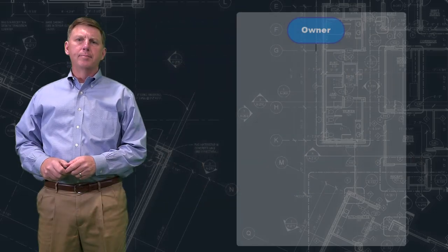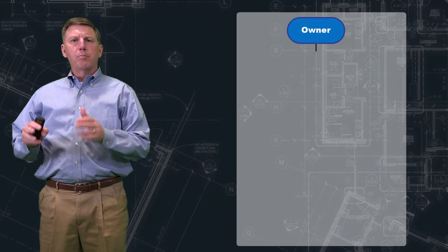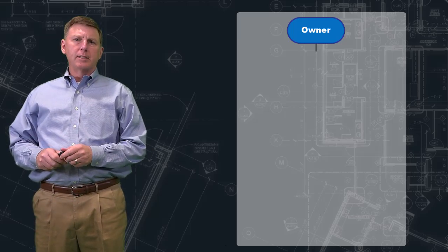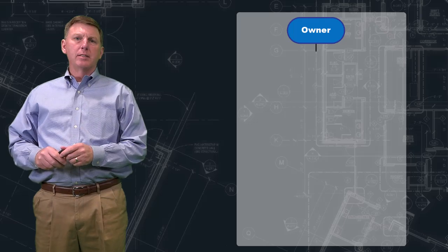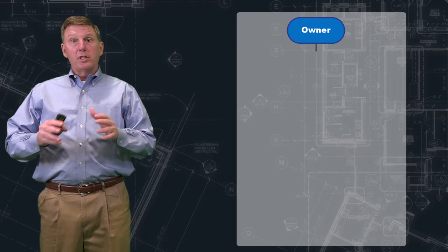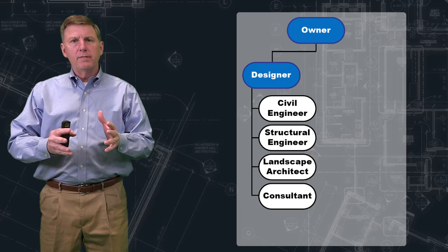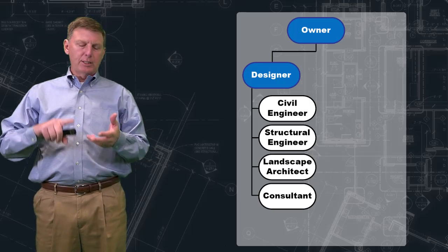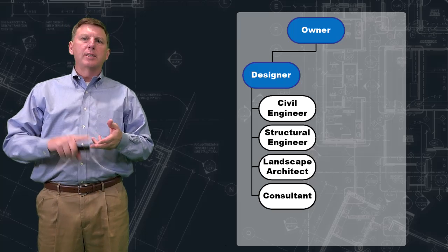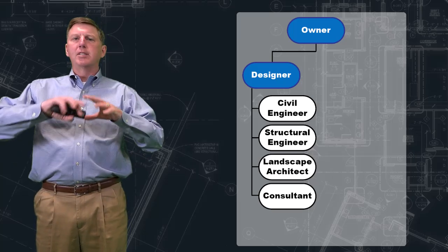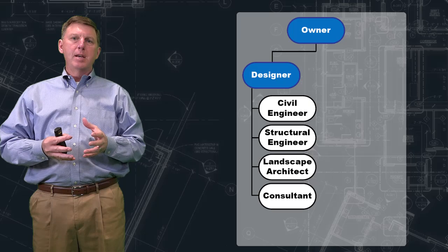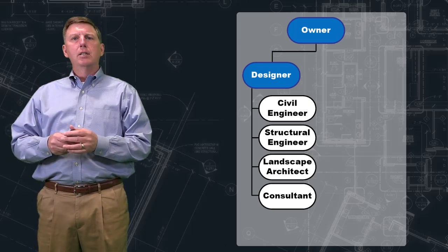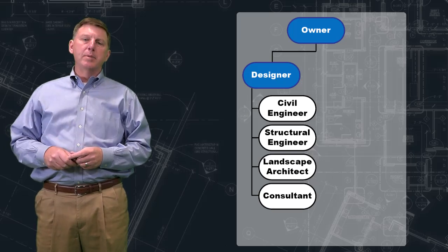Design, bid, build is a process that is used mostly by public agencies to get one of the best prices. That process starts with the architect or engineer completely developing the project package. They do all the drawings, all the specifications. They put the terms and conditions together, the bidding requirements. It's all complete. And only then, once it's complete, is that project advertised or contractors invited to bid.